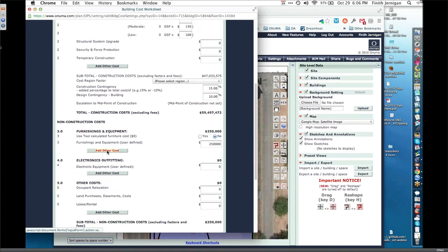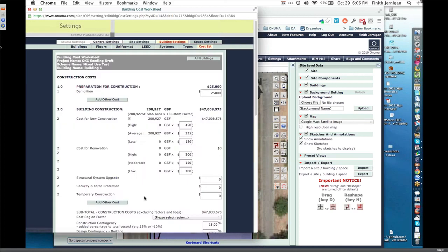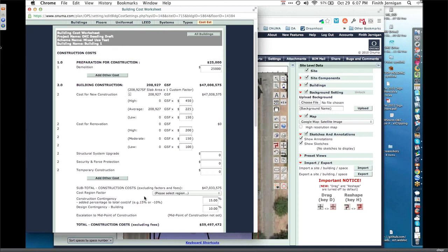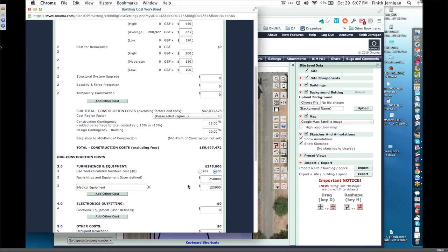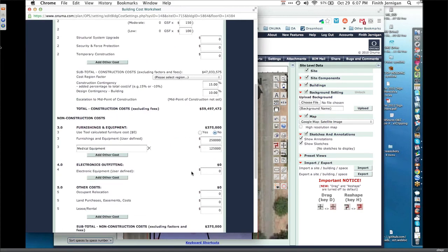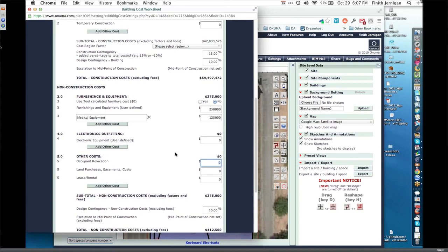You can actually go in and add other costs that might happen. So you can add lines to this if you choose to. So you could add a line that would say, maybe there's a medical office on the 3rd floor, so in order to get that tenant signed up, we've got to add some medical equipment. And the doctor's told us that he needs $125,000 worth of medical equipment in the deal. And you go down basically with all that kind of stuff. If we're demolishing a building and we're having to give somebody a $30,000 payment for their space, the land cost us $1.2 million.